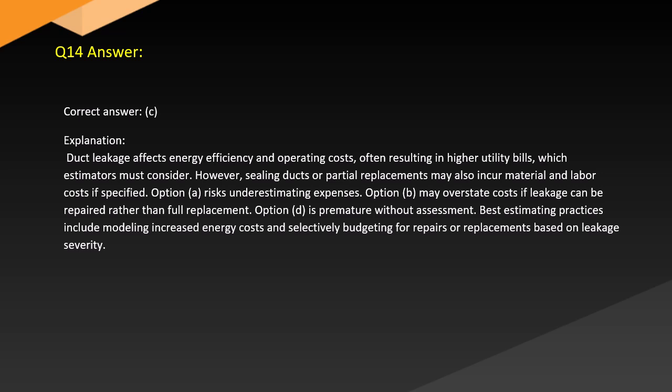Option B may overstate costs if leakage can be repaired rather than fully replaced. Option D is premature without assessment. Best estimating practices include modeling increased energy costs and selectively budgeting for repairs or replacements based on leakage severity.